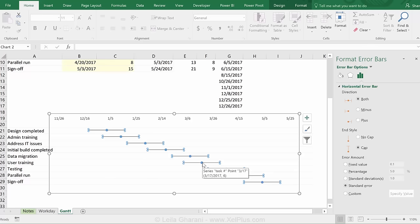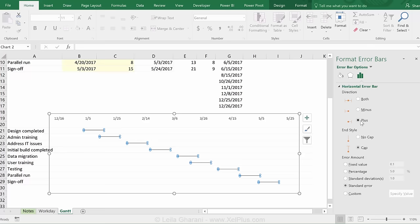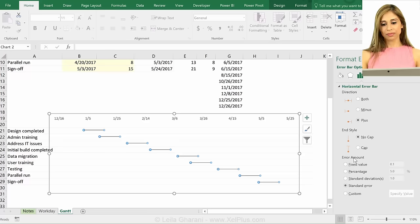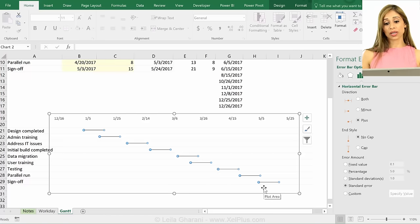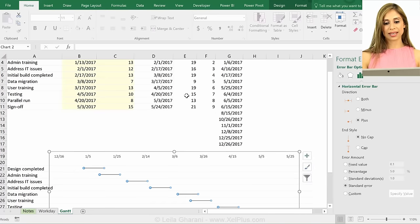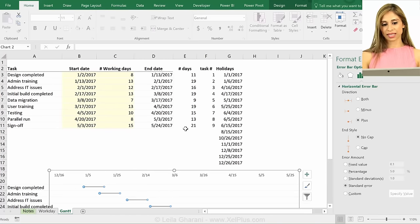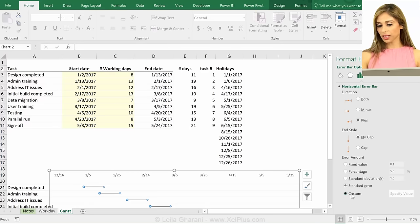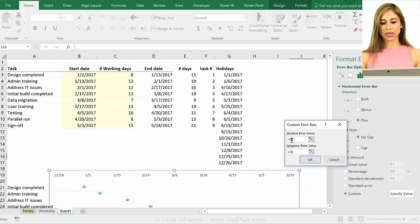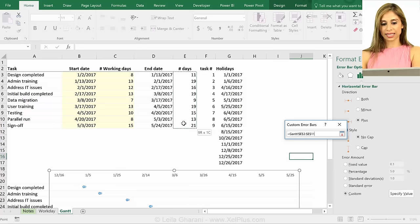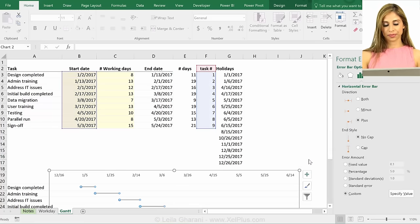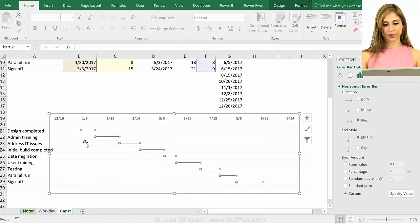Which option here looks right to you? This is my point. Which one of these do I need? The plus, right? Because I have my point and I'm moving this way from my point based on the number of days. I don't want a cap. So the cap is that little line that you can see at the end of the line. I don't want that. How much do I want my line to go across? So how long should that line be? Well, that really depends on the number of days that I have between the end date and the start date. So I'm going to go with custom, click on specify value. And for the positive error bars, I'm going to highlight these.